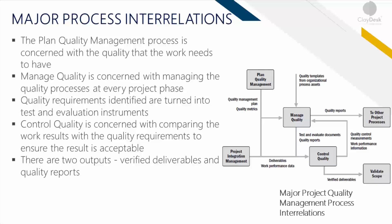Managing quality is concerned with managing the quality processes throughout the project. During the manage quality process, quality requirements identified during the plan are turned into test and evaluation instruments — sort of like milestones or checks and balances at different stages of your project — which are typically applied during the control process. Quality control is concerned with comparing the results with the requirements: you have a quality policy, you see the outcomes, and you compare and match them up.